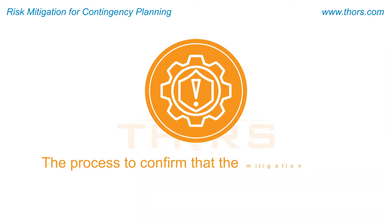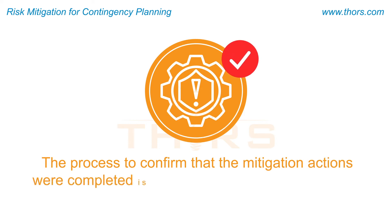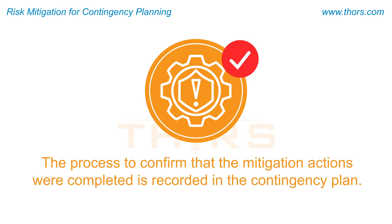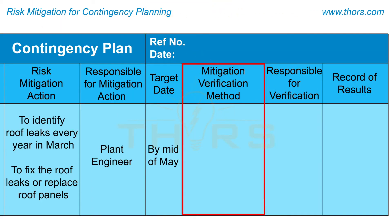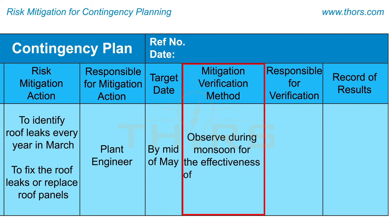Next, the process to confirm that the mitigation actions were completed is recorded in the contingency plan. For the leaking roof example, the verification method is entered as: observe during monsoon for the effectiveness of implementation, in the mitigation verification method column.